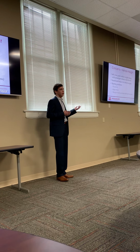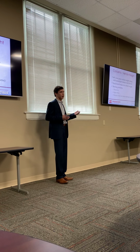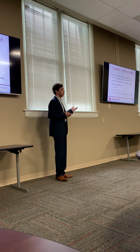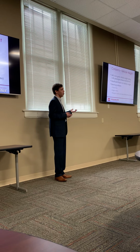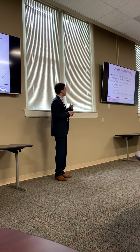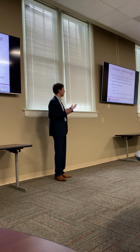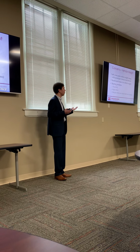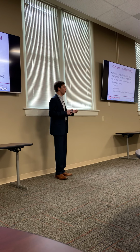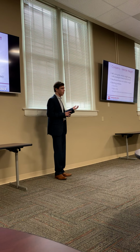The early design made sure that the body was really sturdy and made from corrosion-resistant materials that would stand the test of time. But early design decisions in the project and the selection of the go-kart didn't consider weight capacity. Our team has found out that the vehicle weight is over capacity by approximately 66% over the given weight rating of the Tal Motors go-kart.